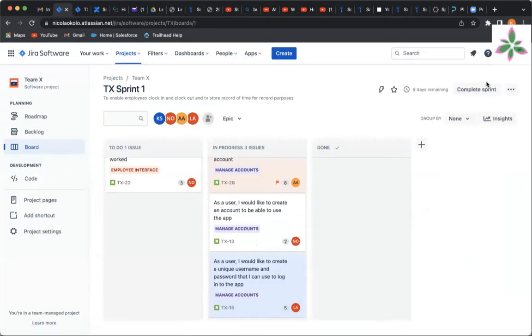Thank you so much, everyone, for your participation and contribution to this meeting. Please remember that one of the Scrum values is focus. As such, if anyone comes to you to work on something that's not in this particular sprint backlog, please send them to me. Additionally, you don't need to wait for daily Scrum to flag an impediment. Once you encounter an issue, please go ahead and flag it immediately.